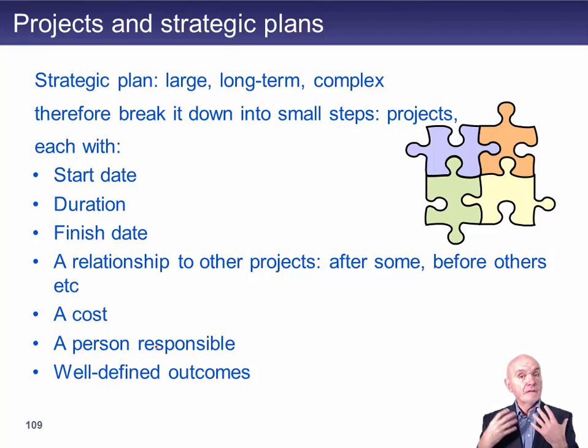And the great thing is that this makes it much more controllable and traceable. Each of these little projects will have a start date. They will have a duration and an end date, and we can keep watch on those. We know how they should fit in with other projects. There is no point in employing people in France if we haven't already got the offices and the factories set up in France and so on. There's going to be a particular sequence that we have to do it in.